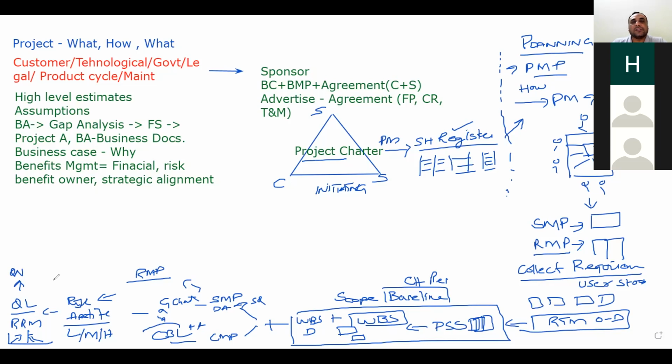So these were the risk response strategies which the risk action owner has to implement. If it is not happening, he will escalate to the project manager. So I tried all the things based on the trigger conditions provided by the risk owner, and it didn't work. So be ready, the risk is going to be converted into an issue.